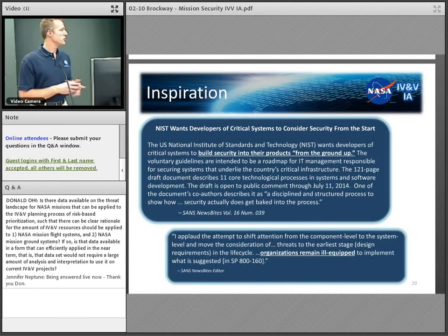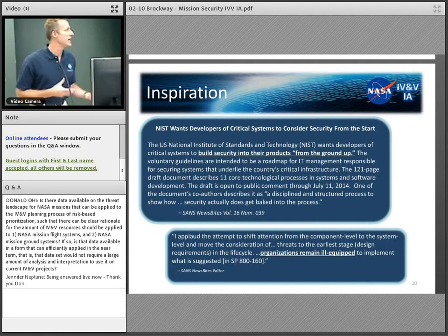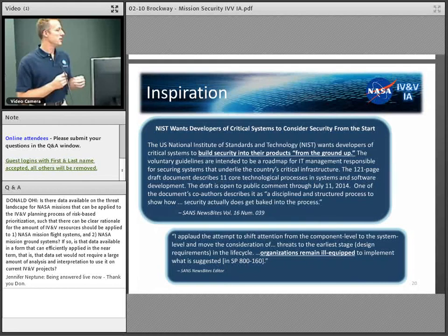And usually what you'll find in a POAM, Plan of Actions and Milestones, is the recognition that we do have a deficiency, but it's going to cost X millions of dollars to fix it. And as long as that's true and not overinflated, you don't want it to just be stalled or set aside. But you want it to not be an unfunded mandate, so to speak, such that you're motivating the stakeholder to somewhat reassert that.